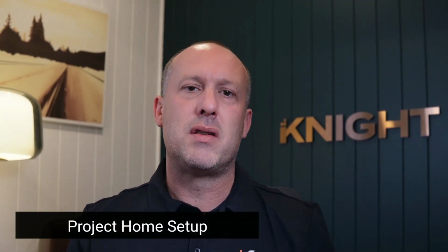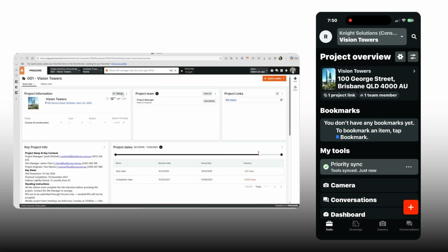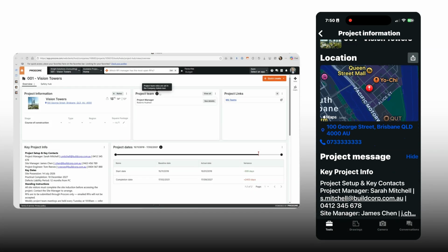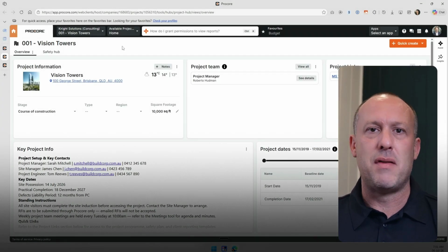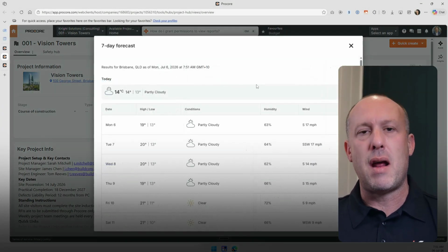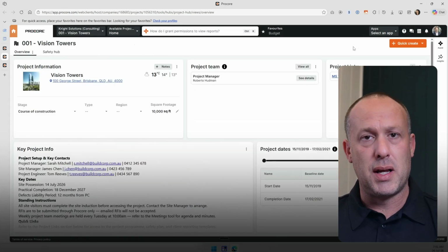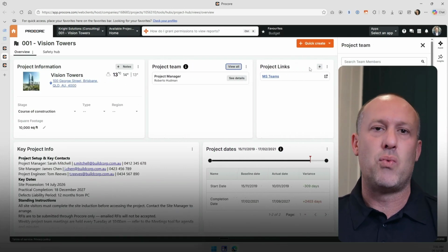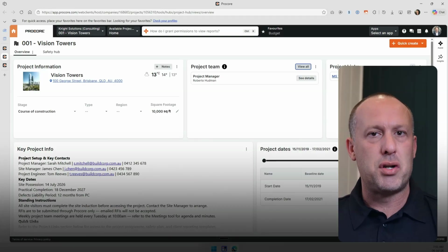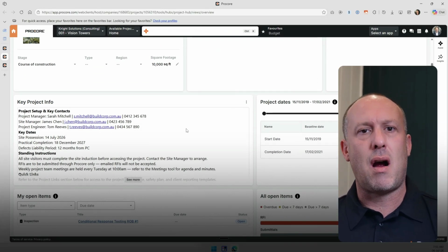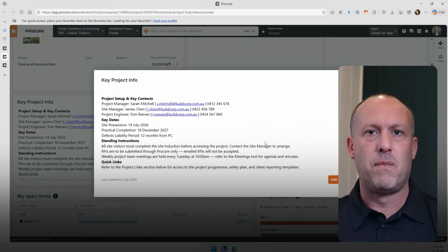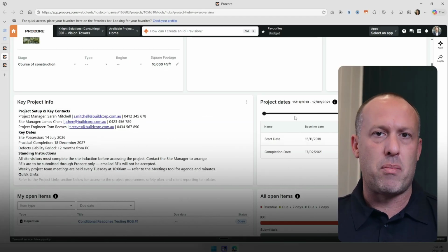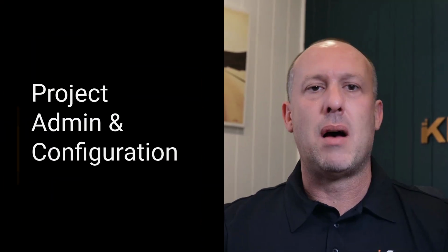So let's start with the project home. This is the very first thing your team sees when they open the project. In fact, it's the first thing that everyone sees when they open the project, whether they're on web or on mobile. You've got persistent project messages, and this is a great place to put key information that everyone on the project needs to see. Your project links, important dates, and your team panel are also really important. If you're using Procore scheduling or programming with an integration, you'll see the current scheduled dates and milestones here too. You'll also see project weather, provided you have a project address in the project. So take 5 minutes to set this up properly. It's the front door to your project. Make it useful.